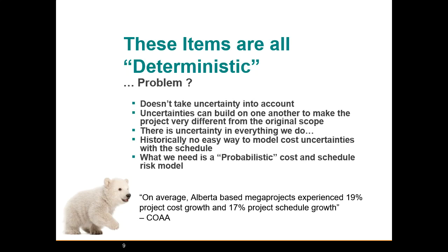Again, going back to the Construction Owners Association of Alberta, on average, Alberta-based mega projects experienced a 19% cost growth and a 17% schedule growth. So again, these things are fairly tightly correlated.